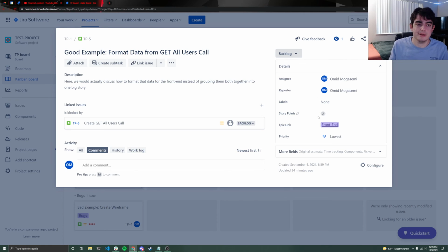Code cleanup as well. Sometimes if it's a big story code-wise, maybe there's not a lot of research, but it's 3-4 hours of straight coding, that person's probably going to need time to clean their code up, make it look pretty, and do some optimizations on it. So maybe give them an extra half hour, an extra hour.